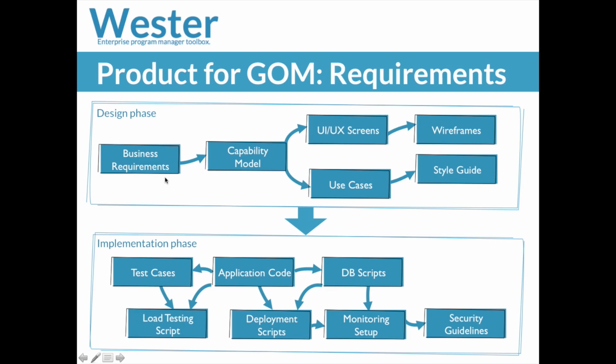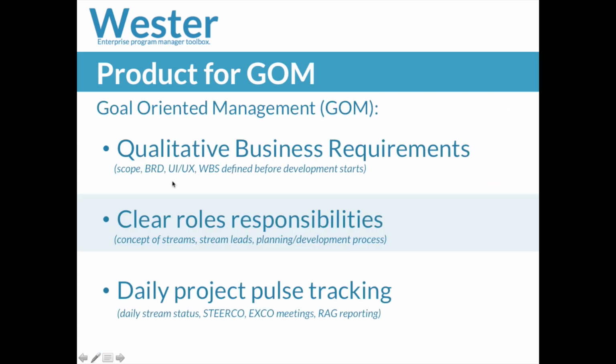Firstly, it's extremely important to have the business requirements, planning, and all the formal procedures in place before you start any development. Otherwise, if the requirements or the ecosystem change during the implementation phase, there's a huge risk of getting an unstable product with delivery delay and poor maintainability. Such projects usually end up as a big disaster. It's important to define dependencies between different types of requirements, and also to define a clear set of deliverables, a good flow of their creation, and track the influence of each document on other artifacts during the project's implementation process. Another important organizational effort is to get clearly defined roles and to look at the responsibilities of each member of the team inside the project.